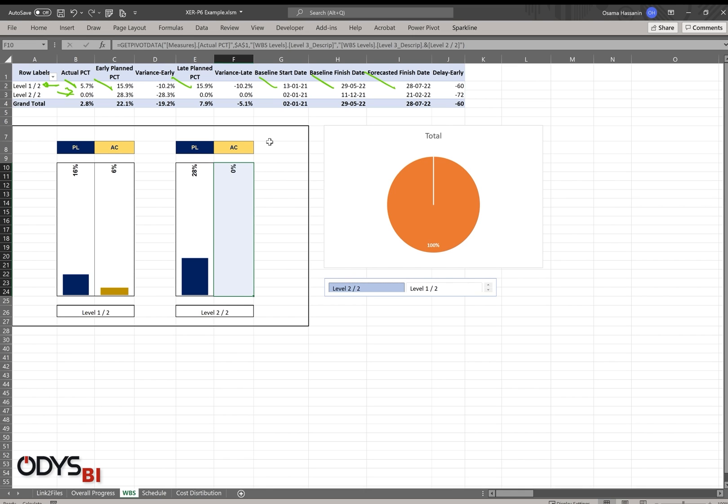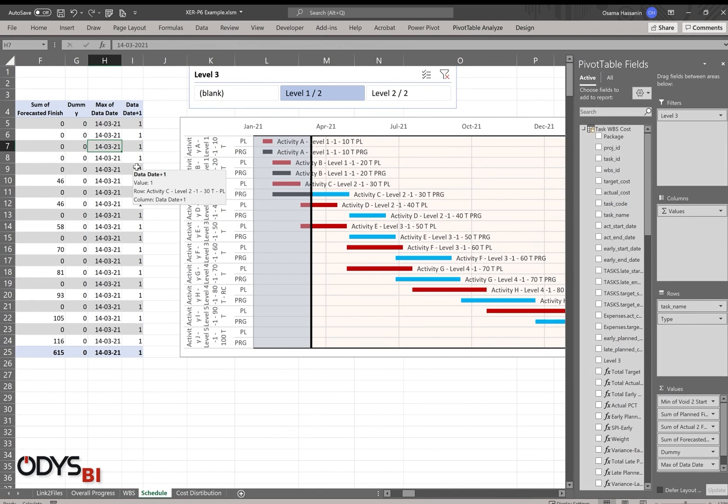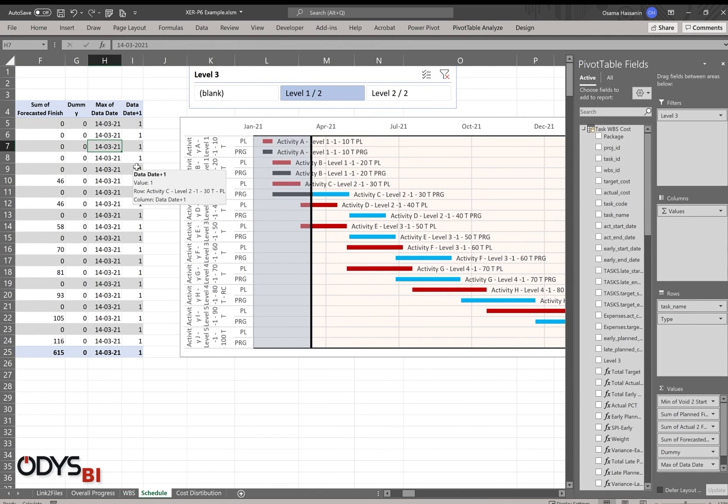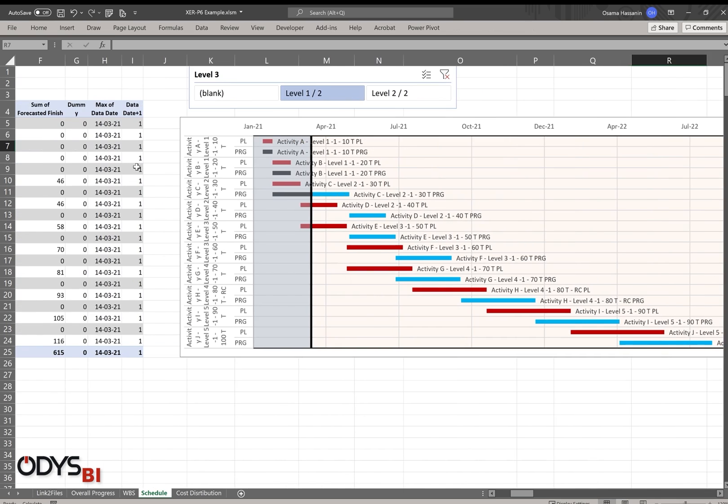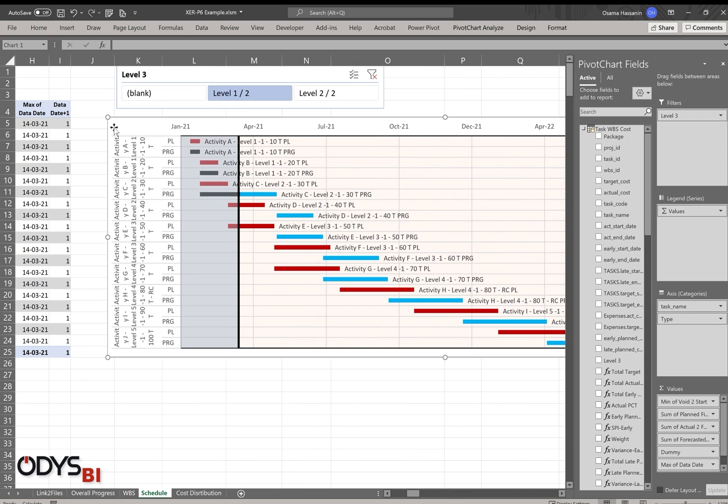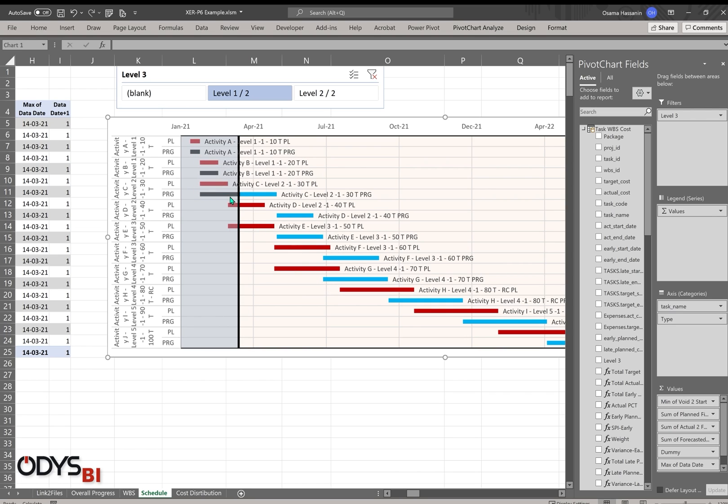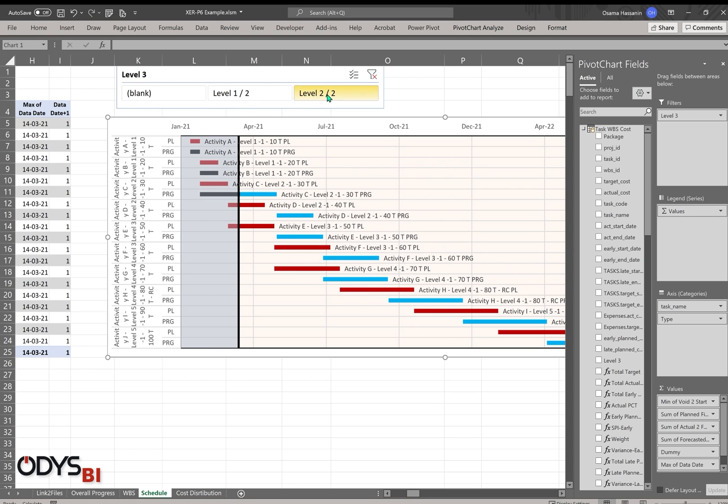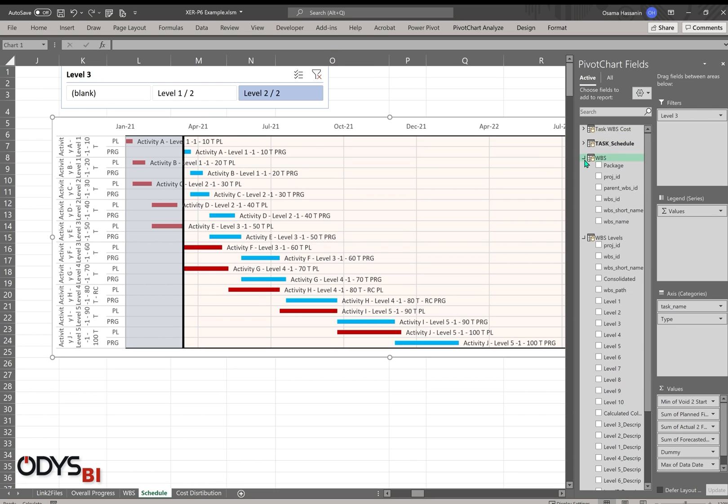Let's go to another example. If you can see all the data is pivot, pivot tables. I have created a quick schedule with pivot chart in level 1 of 2. This is the activities. The legend of this pivot chart: the red is the planned activities, the black is the actual, and the blue is the forecast. If I go to level 2 of 2, it is interactive. As you can see, we are creating our pivot charts and pivot tables based on the data set I have in my Excel.